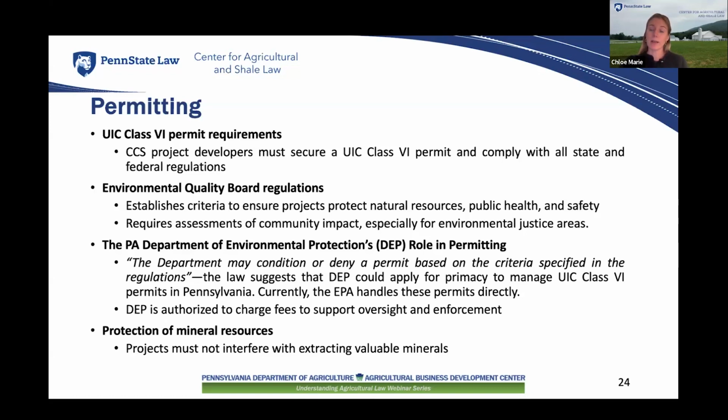At the DEP Oil and Gas Technical Advisory Board meeting that was held in March 2023, the board talked about Pennsylvania's approach to carbon capture and storage, and it was mentioned that DEP is considering pursuing primacy of such wells. But that's still where things stand today. So until Pennsylvania gets primacy, the EPA will continue issuing UIC injection permits in the state. And the law also allows DEP to charge fees for permits or ongoing project management to help fund the oversight and enforcement of carbon sequestration activities.